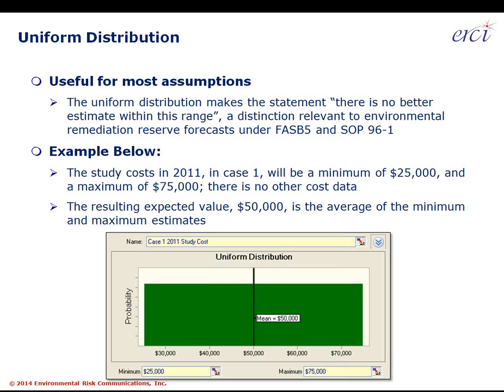In other words, if you put in a uniform distribution with the gaming expectation that you're going to try and get a low end of the range for the entire site, every single assumption that goes in, every single uncertainty has to be characterized the same way with a uniform distribution, which I've yet to see happen in real life. There's inevitably one assumption where something is more likely than something else. However, again, there's a conscious effort. This is more or less advice to an auditor.